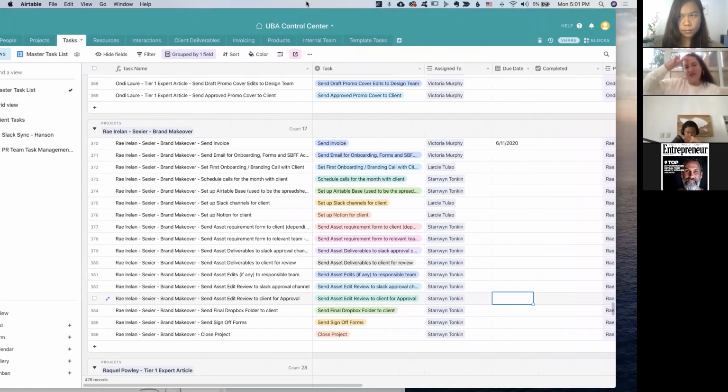The reasoning is that we've had quite a lot of clients in the past who, when they start a big project, disappear halfway through, and then come back 6 months later. So we have to show that they've signed off at each stage. They sign off per asset to say, yes, I received it. So the signature is basically a receipt, like, hey, I got it. Yes, exactly.